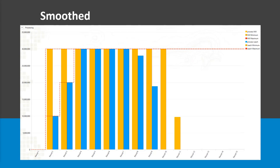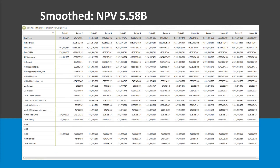Here is the problem. Now that I've done this smoothing, our NPV is $5.58 billion — only a 2% decrease in NPV, not worried about that. However, in period one I'm now at negative $935 million. Originally I was looking at about negative $680 million. So that is a $240 million increase in the loan that I would need. And if I hadn't already planned for that when talking to the bank, I may not be able to get that money. So if the loan is already in place, I need to make some changes.